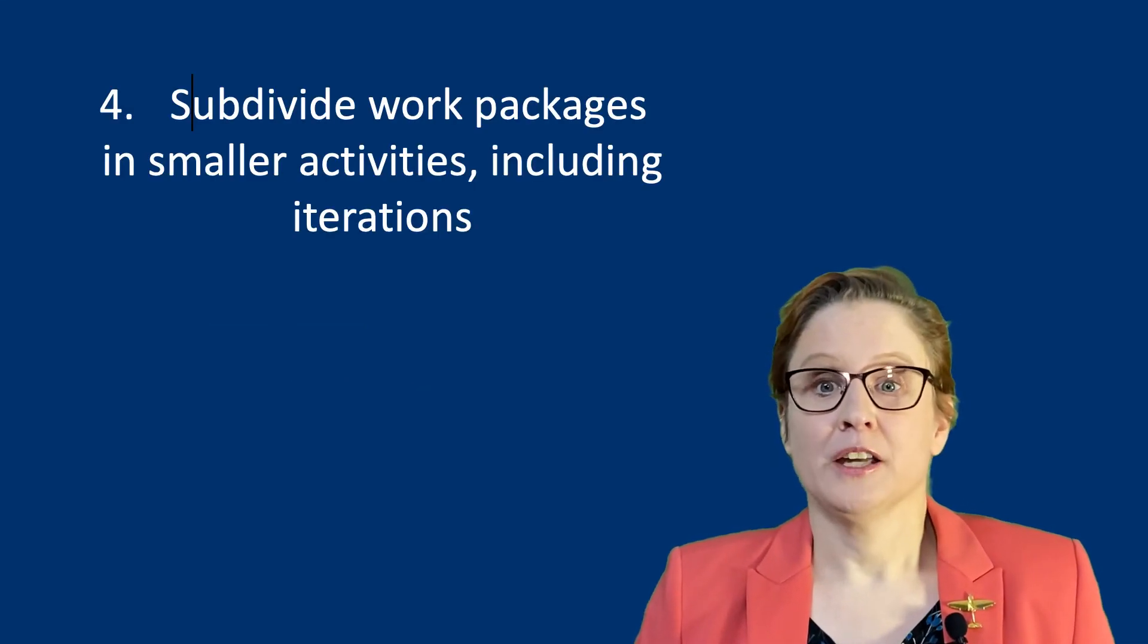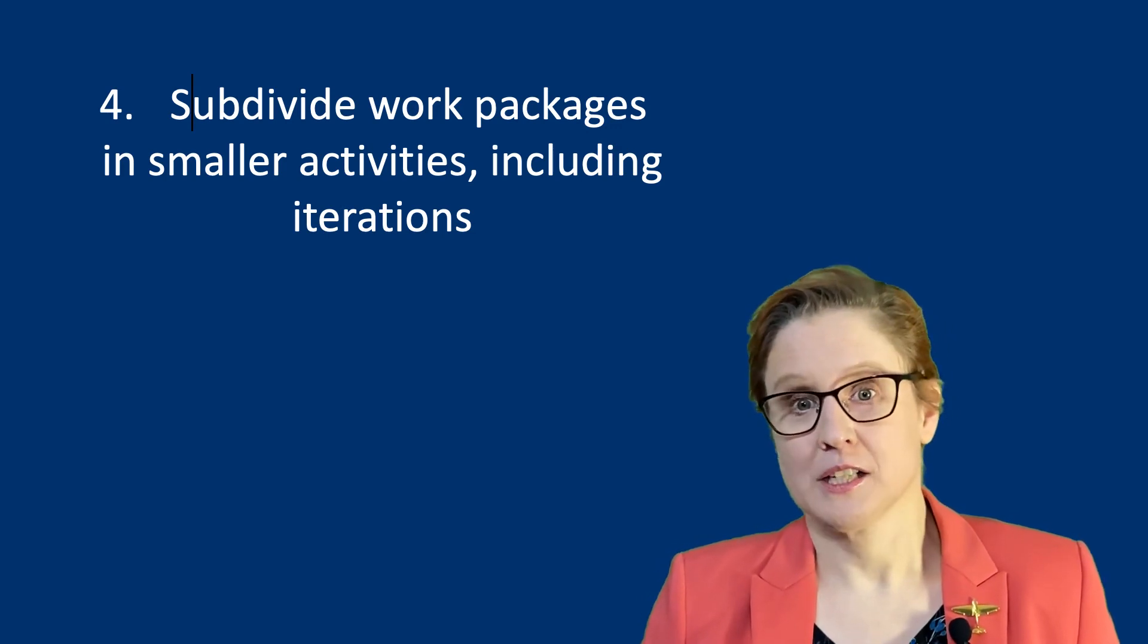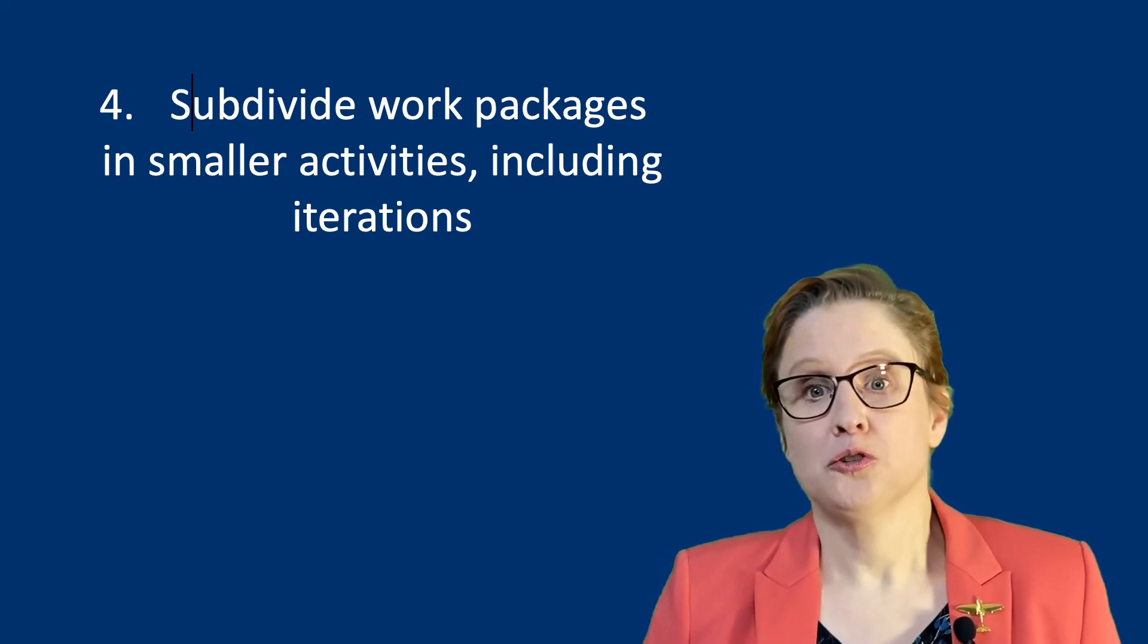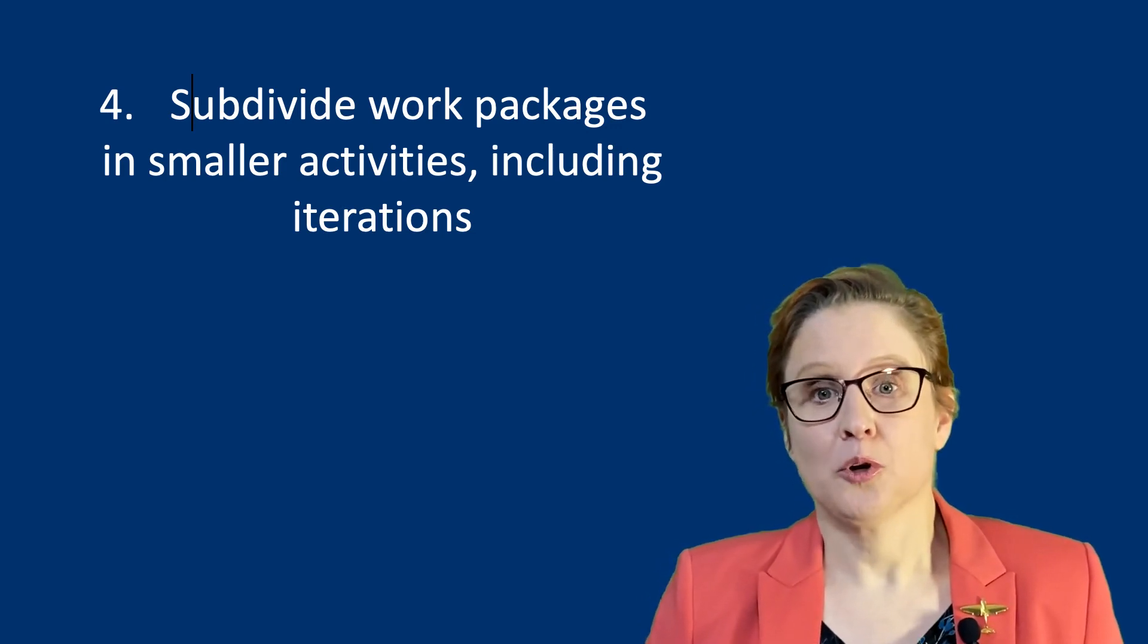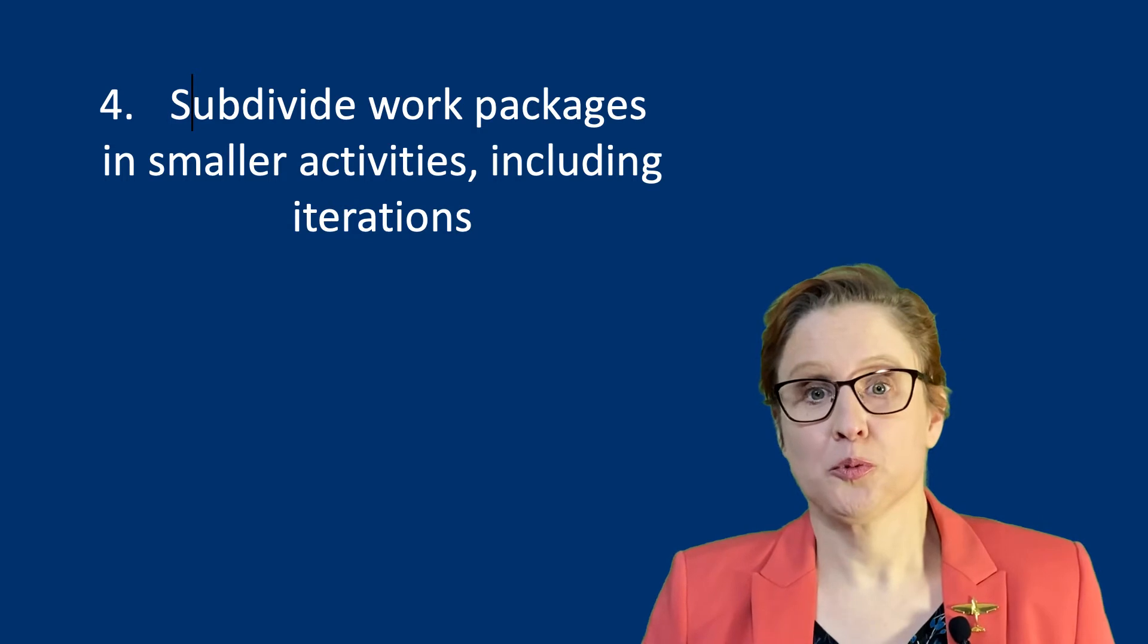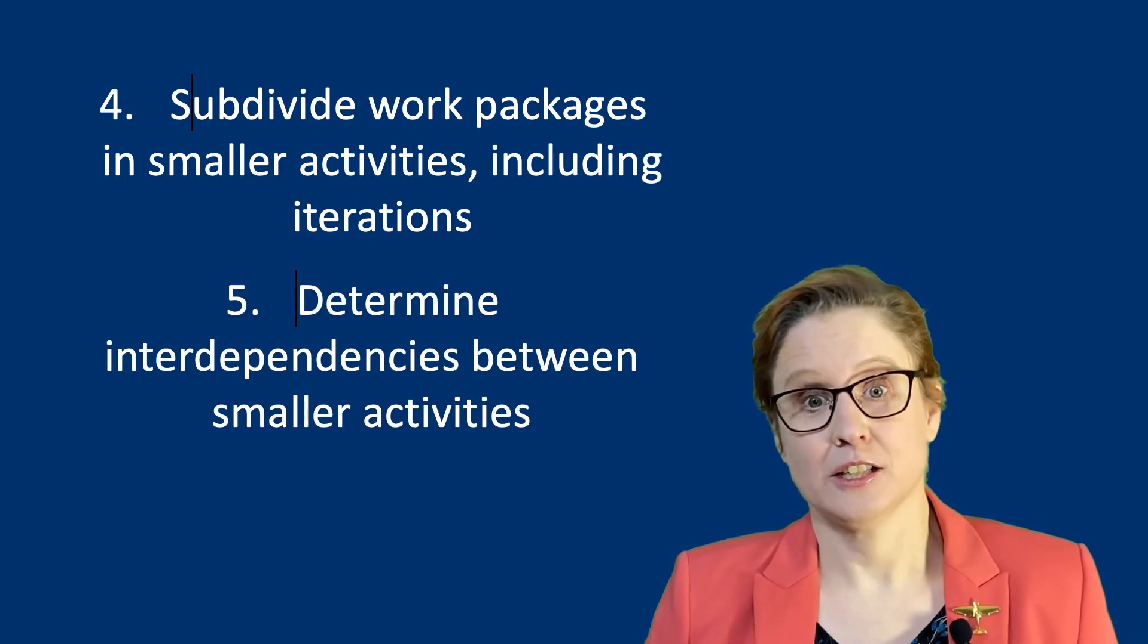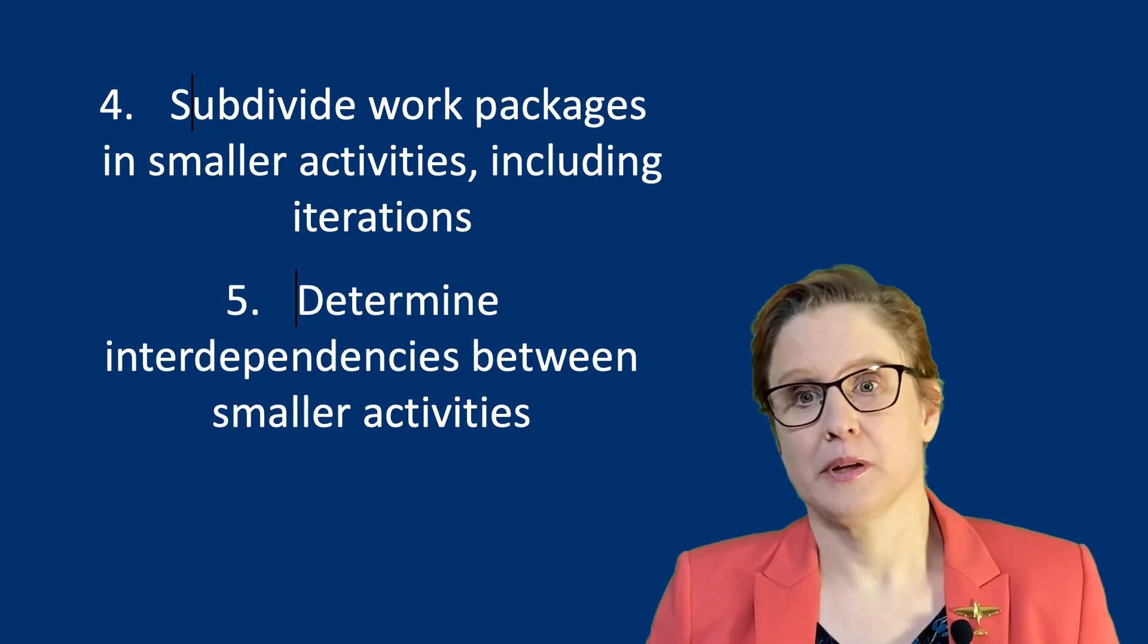Once you have defined the interdependencies on a work package level, zoom in on each work package and define deliverables per work package and identify their interdependencies.